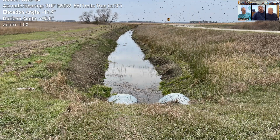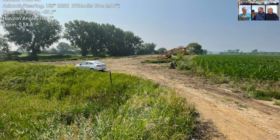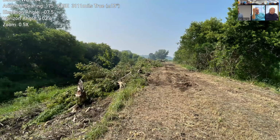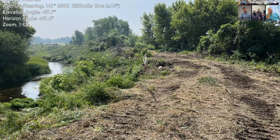I will make a motion to approve the drainage claims. Second. I have a motion and a second to approve the drainage claims. Is there any further discussion? Just one question, Jacob, how long will you hold back the last $14,000? 30 days, so we'll release it on January 18th. My question would be, say that seeding didn't take, would we have them redo that under this? We do not hold them responsible for seeding.